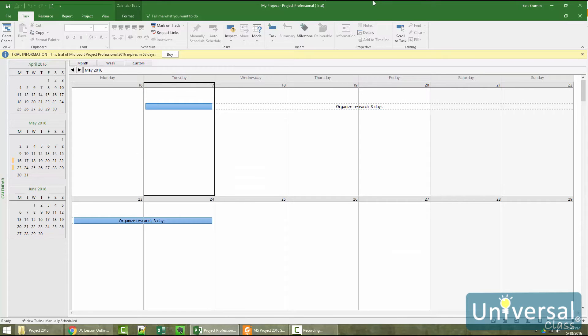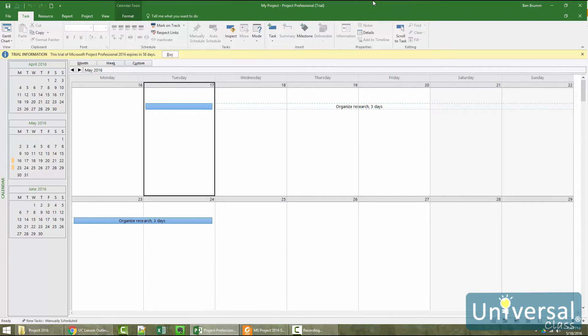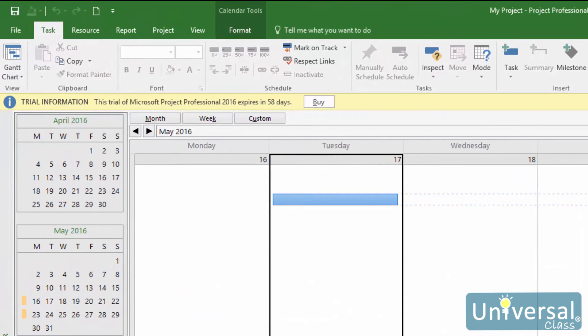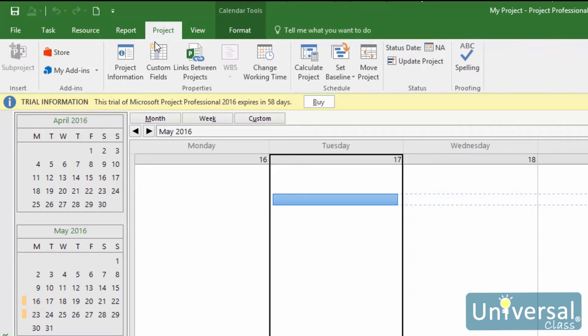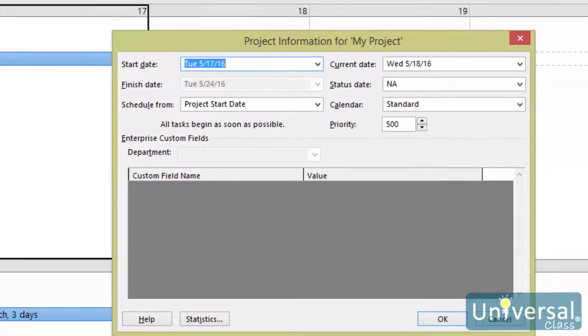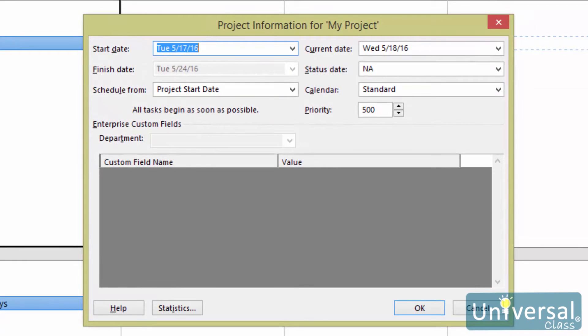To start with, let's open the project calendar, which is different from the calendar view. Remember, this is where we choose the base calendar that we'll use for a project. To access the project calendar, go to the Project tab, then click on the project information button. You'll see this dialog box appear.